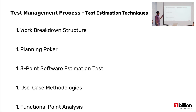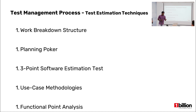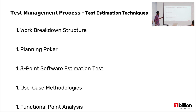The test estimation techniques we use in our CR project are work breakdown structure, planning poker, and function point analysis. With work breakdown structure, when the client delivers requirements, we break those requirements down into submodules and estimate the time for each submodule, then allocate to each individual. At the start of each sprint, we have meetings with our stakeholders and use planning poker to estimate our tasks.